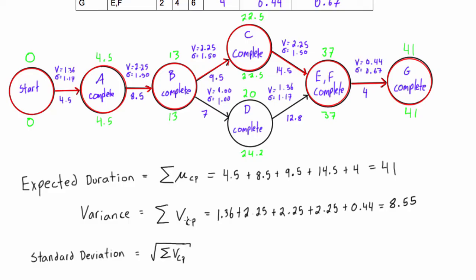Now neither of those mention anything about the standard deviation, so without getting too much into it, just know that's something you have to watch out for. You can sum to get the expected duration and the variance, but you can't just sum up the standard deviations. That's not how the statistics works.